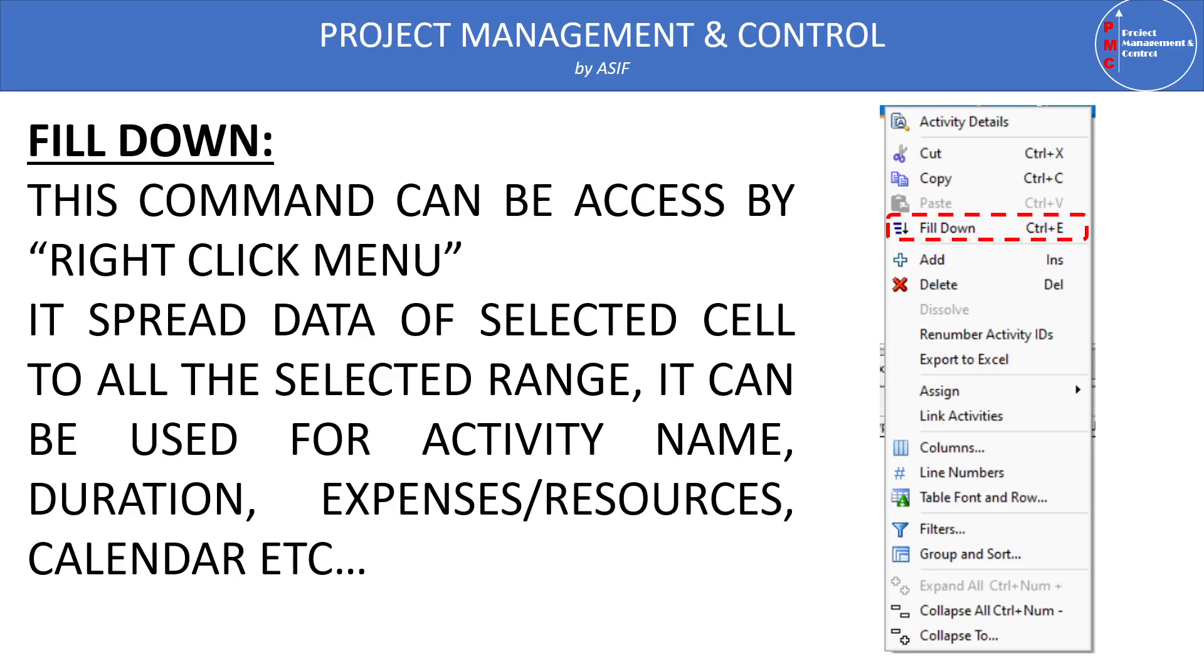And only the data which is calculated by P6 itself cannot be defined. For example, total float cannot be defined by the fill down command. Activity ID cannot be modified using the fill down command because Activity ID is a header of all the information related to this activity in the P6 database. So we will see this in more detail in P6 itself.